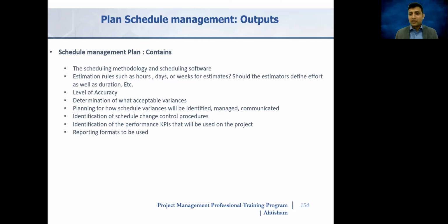Also part of the schedule management plan is the discussion on how you will maintain changes to the schedule model. As part of progressive elaboration, there are many new activities that will be uncovered, and those will definitely need to be added into the scope baseline. So these changes will impact your schedule also. How will you reflect these changes in the schedule baseline? Will you be using versioning of your schedule baseline? You cannot jump-start adding activities in MS Project. You have to maintain a before and after look of your schedule baseline.